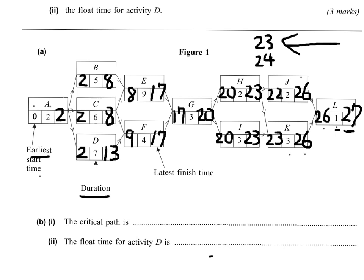So let's check. Starting from I, you should have 23. And for G, 23 take away 2 is 21 going this way, and 23 take away 3 is 20 going this way. So you're going to have to choose the smaller one, 20.